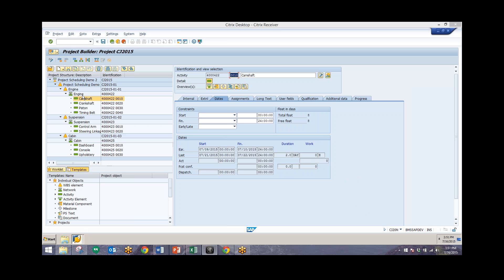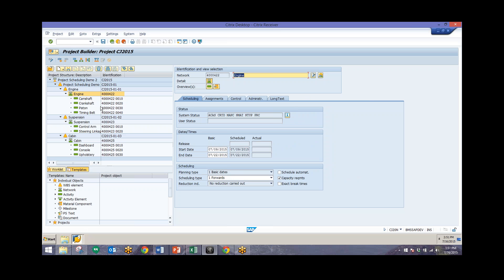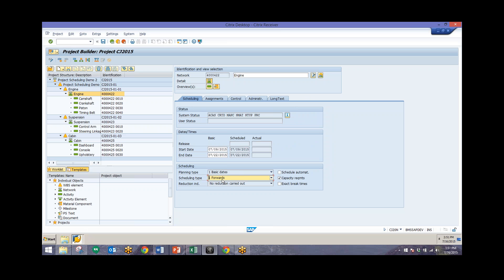Next I'll talk about scheduling types. Looking at the network header, we have forward, backwards, only capacity, and current date scheduling types. Forward scheduling means the system will schedule the network from the very first date and move forward — this is used if you know the start date but don't know the end date. Backwards scheduling starts from the last date of execution, used when you know the end date but not the start date — for example, if you have an agreed delivery date. The default for networks is forward scheduling.